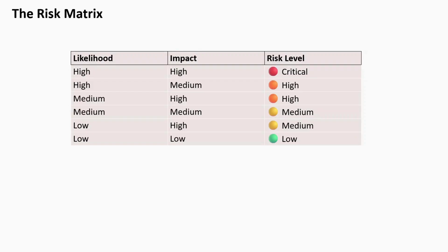An example scenario could be an e-commerce application crashing on Black Friday due to server overload. The likelihood of occurrence is high, because due to the load there is a high chance that the server may crash. If it crashes, the impact is also high. The company can get into financial losses. If the likelihood is high and impact is medium, then the risk level is considered high.